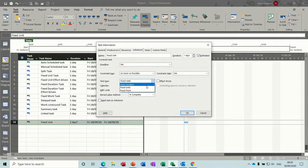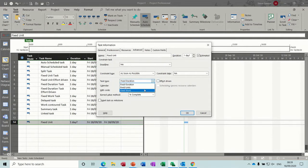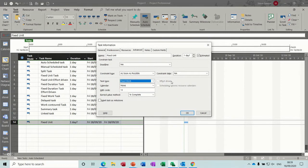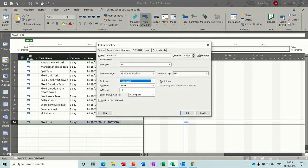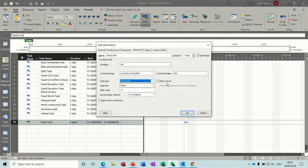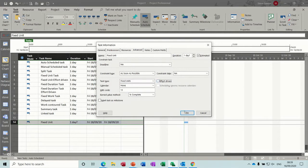And if I click on fixed duration, you've got the effort driven tick available. On fixed work, you don't have the option to take it on or off, but it is on. So that will affect your tasks if you're not aware of that. But let's just go back to the first one. And I'll leave the tick off for a second.